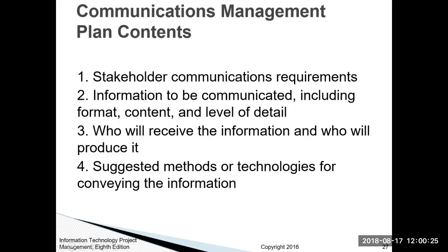Communications management plan content. We have the stakeholder communication requirements. Information to be communicated, including format, content, and level of detail. Who will receive the information and who will produce it. The suggested methods or technologies for conveying the information.